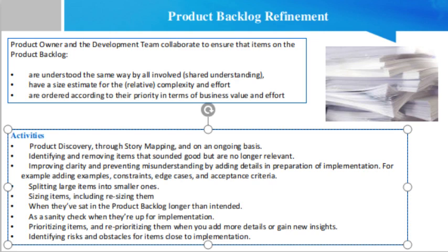Who facilitates a backlog refinement meeting? Quite often it will be the product owner. Though logical, it carries the disadvantage that the product owner has a high stake in the direction and outcome of discussions. Getting the Scrum Master to facilitate is a step in the right direction, as he has no official role in the meeting and can be more objective.